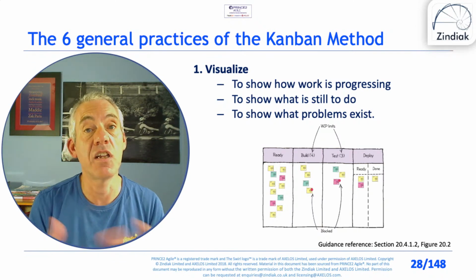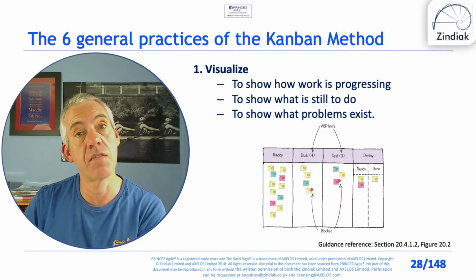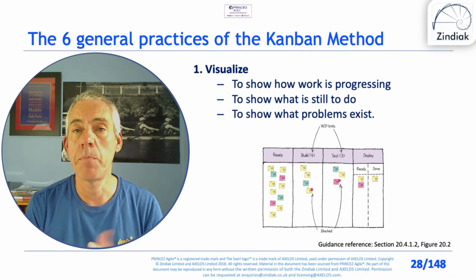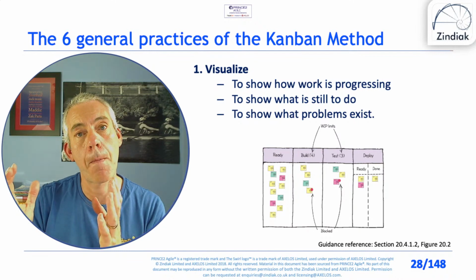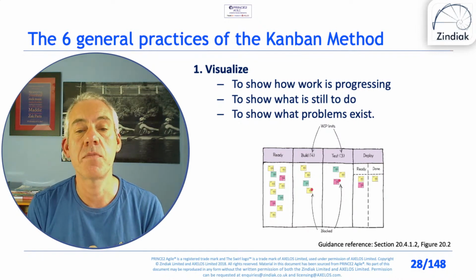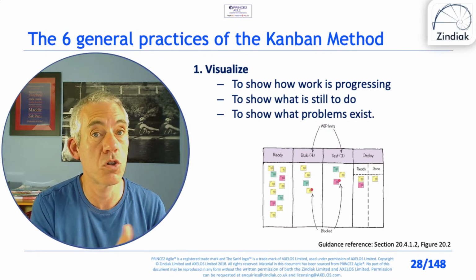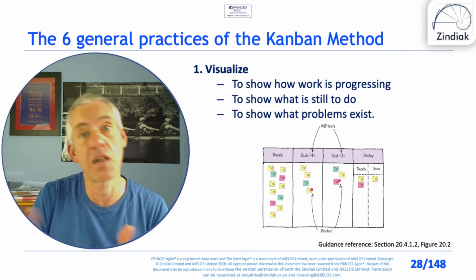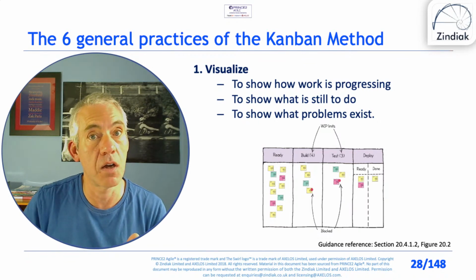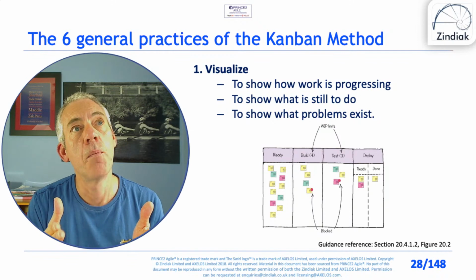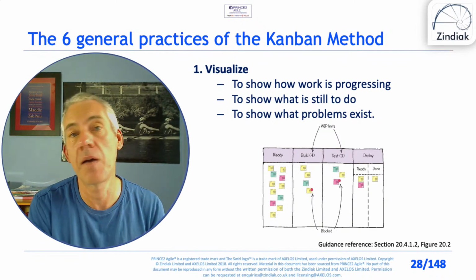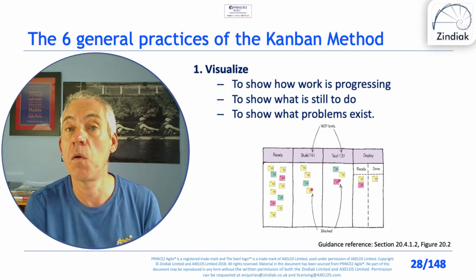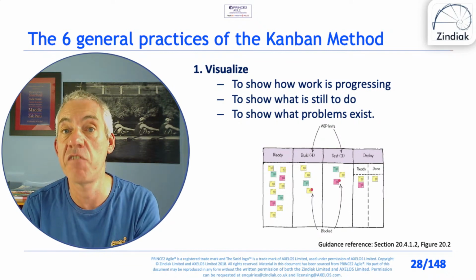We need to deliver, and you don't want to leave delivery until the end of the sprint. So it's always a balance. If you've got some big backlog items, you probably want to start them towards the start of the sprint because that's going to give you more contingency if they take a bit longer. But equally, if you just start big backlog items at the start of the sprint, you're going to go a long time potentially before you deliver anything.